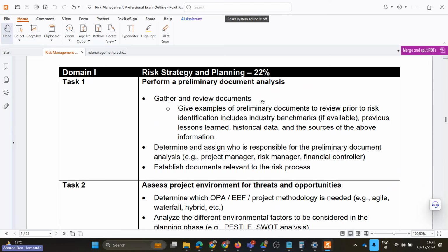And let me tell you why. This is something really, really important. Now, guys, lessons learned come from the issues and how they were solved in previous projects. An issue is an event that has already occurred. It took place. It has got a negative impact, and the way the project team resolved the issue, applied the pivot or a workaround, they will have to document in a lessons learned.